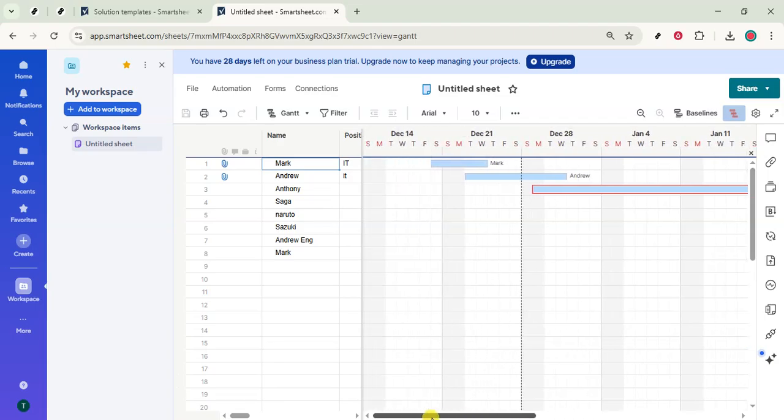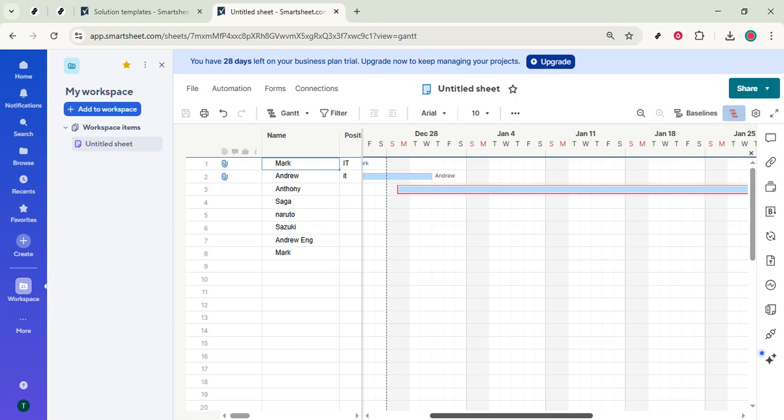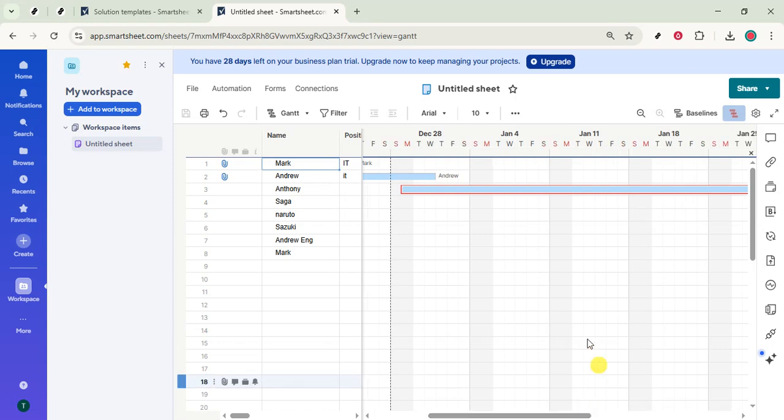If nothing highlights, it generally means tasks aren't linked through predecessors, or the schedule lacks dates and durations to calculate timing. Connecting tasks and ensuring realistic timeframes will allow the critical path to appear the next time you show it.